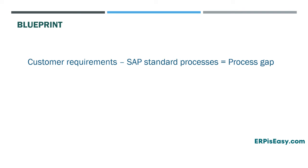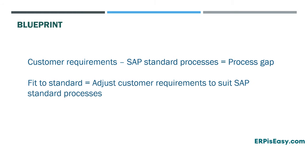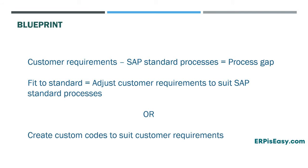The next phase is the blueprint phase. Blueprint workshops happen during this phase, where the customer's requirements are analyzed against standard SAP business processes. Then the gaps will be identified and a plan will be created about how to address those gaps. Either the current business processes will be changed to suit SAP's standard business processes, or custom codes will be created to satisfy customer requirements in the SAP system.